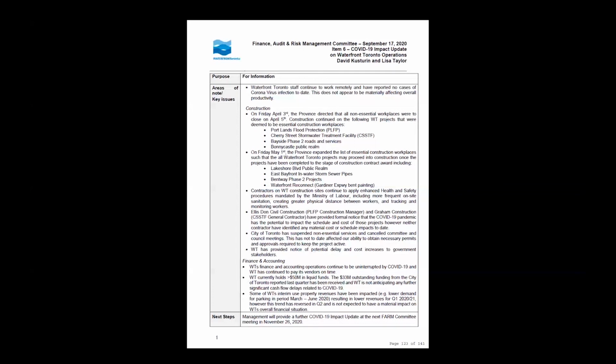And just a quick follow-up, I apologize, but just on the PPE side of things, within our contracts, who's responsible for the PPE? It's 100% our contractor's responsibility to comply with all Ministry of Labor requirements. They are the constructor, so they have implemented all of the necessary health and safety requirements that are mandated by regulation and legislation. They have provided us summaries of that, and we've reviewed those. We find them acceptable, but we, as a matter of policy and practice, do not provide direction to our contractors in terms of health and safety compliance, because we do not want to assume any liability for that on the sites. Thank you very much. That's all I have.